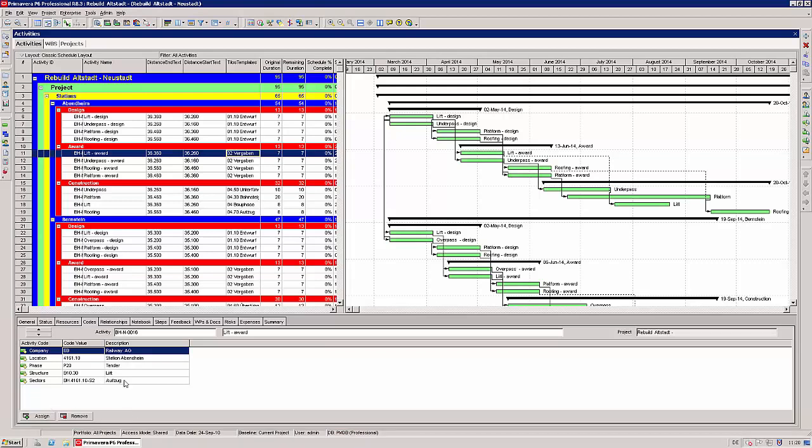Sectors is very interesting. This code is assigning the locations to activities additionally. During import, this code will be connected to a Tilos sector profile. Thus we can connect the task to location coordinates defined in this Tilos sector profile.